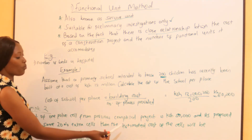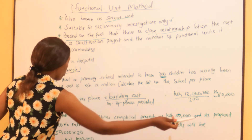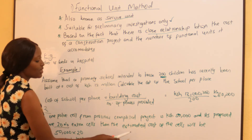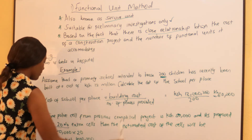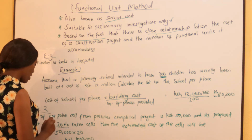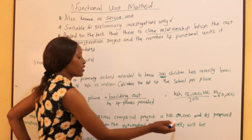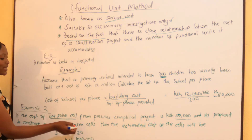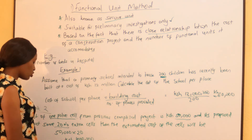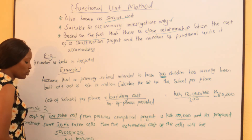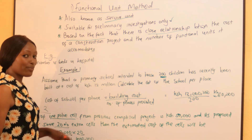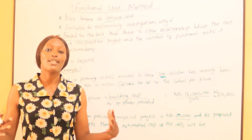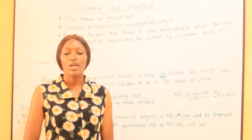Example two: the cost of one police cell from a previous completed project is 50,000, and it is proposed to construct 20 additional cells. The estimated cost of the cells will be: cost of one cell multiplied by 20 cells equals 1 million. I hope that is clear. The functional unit method is the first and simplest method of approximate estimation.